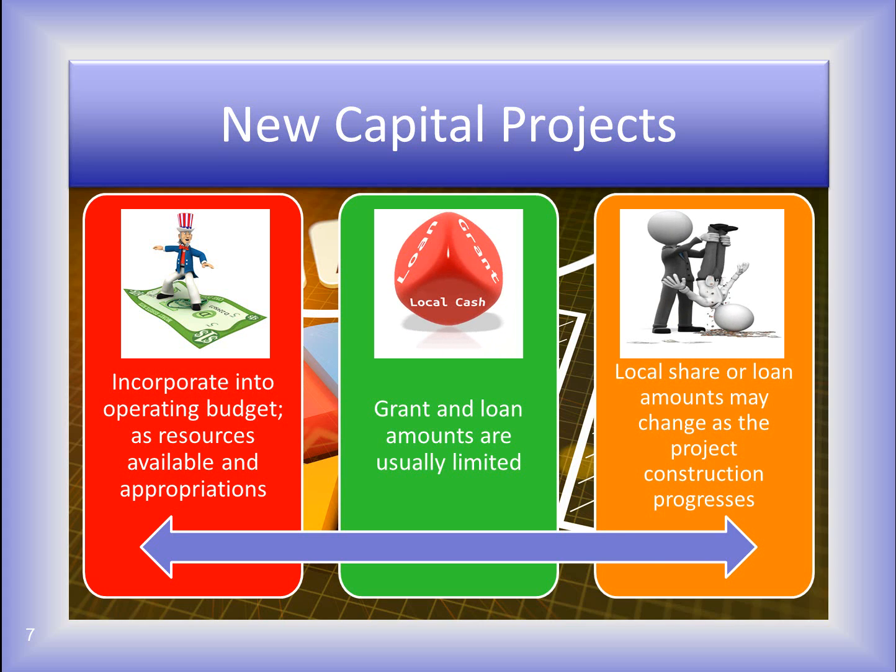As the project progresses, change orders approved by the board may also require additional local cash or loan money to be added to the project, requiring changes to the resources available, your amended certificate, and the board adopted appropriations, requiring legislation. The project remains fluid until all final decisions are made, and it's really challenging to keep both the budget components and the cash up to date with the required changes.